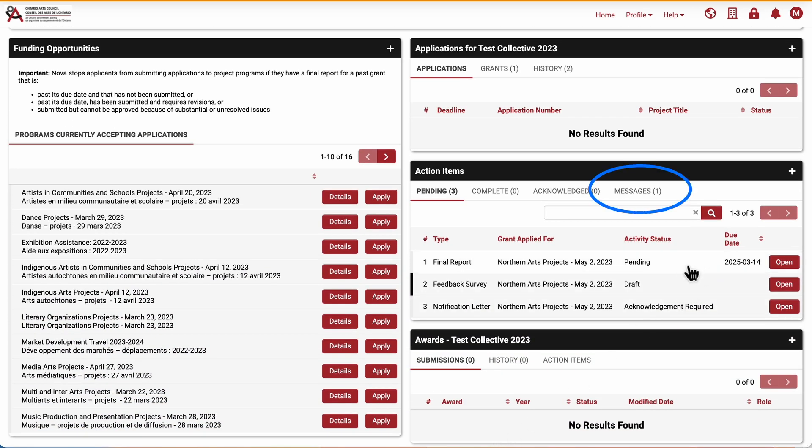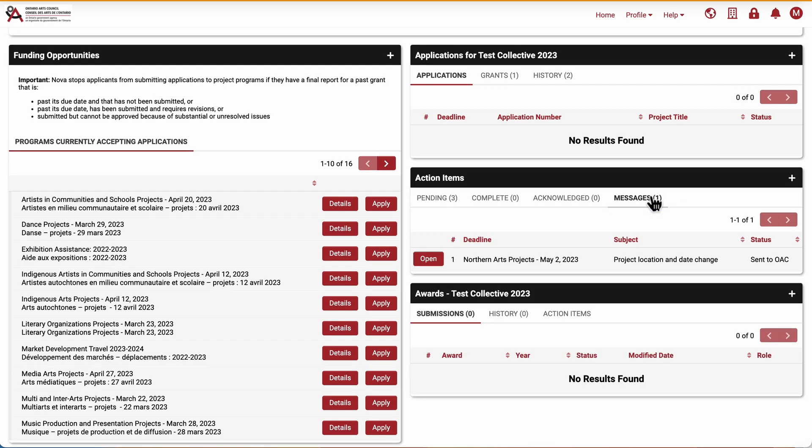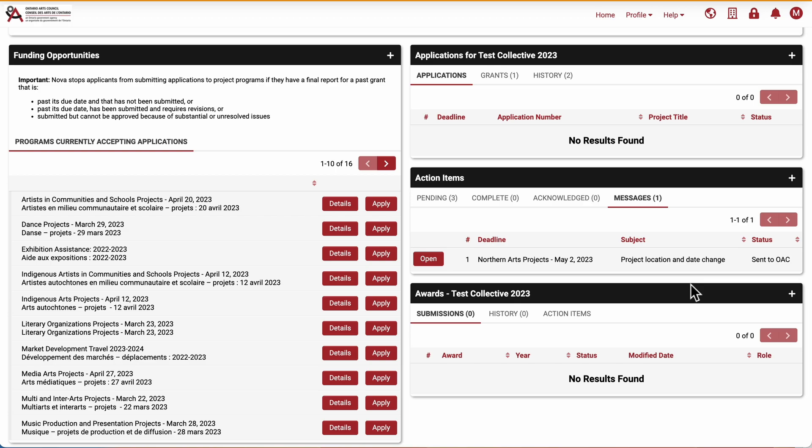My request for a project extension now appears in Messages. The program officer will review my change request. They may need to request further information, or will send a message stating that my change request has been approved.